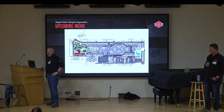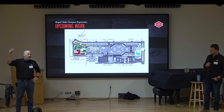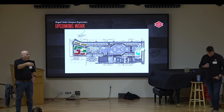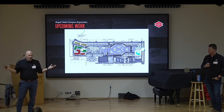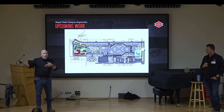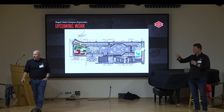Any questions on that from a date perspective? And again, I had some questions afterwards last week just to clarify. When we give these dates, this is when we are planning on giving the facilities to Royal Oaks, based on the county approving us to give it, for Royal Oaks to use it for whatever Royal Oaks needs to use. That doesn't necessarily mean that that's when Royal Oaks is going to open that building or have people move in. I know that was some confusion last month over some of that.